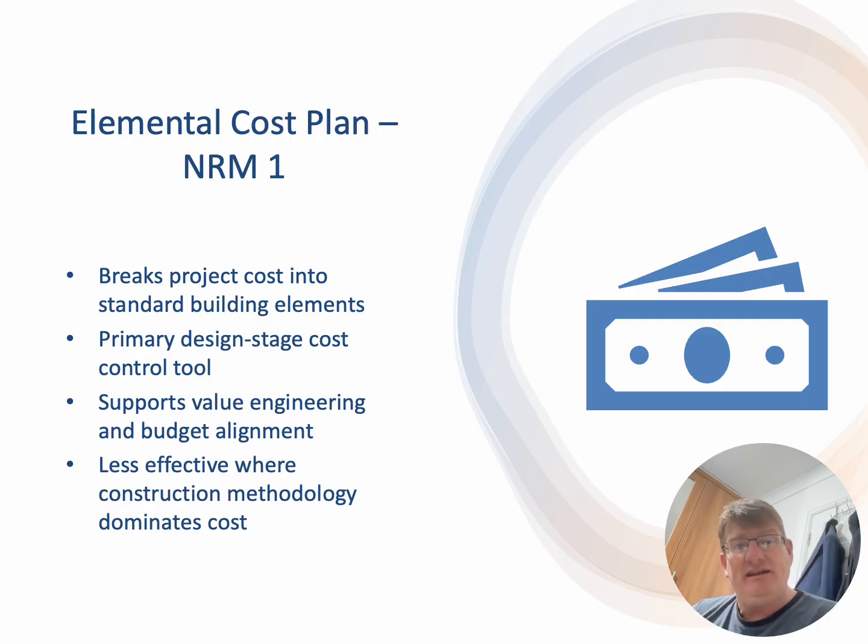it's all in there. Standardized, generalized, compared, consistent, a degree of certainty, okay, not accurate, but again, it'll only give you a ballpark figure. But it's breaking now the building down into 13 elements.